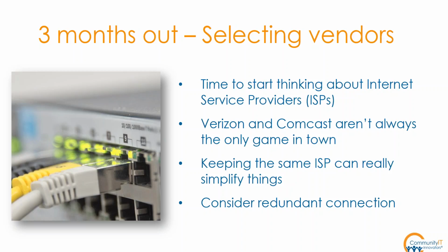Right. A lot of people just have an old contract with their ISP that hasn't changed in years, and they don't even know what deals are available. And also, a lot of buildings, at least in downtown DC where we are, have other ISPs in the building that you may not have heard of as a residential user. So you're going to want to ask your landlord at the new office what ISPs are already in the building, and then call them and see what deals are available.